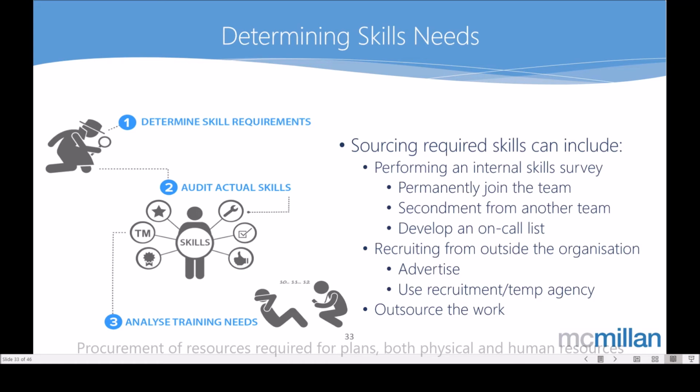So part of that, often as part of the planning process, is doing some type of skills analysis or determining what is required, and that's just a matter of identifying as you're going through the breakdown of your planning. As I talked about, particularly when I was talking about work breakdown structures, project tools for planning, identifying the skills that you need. You list down those skills, and then you can have a look at your existing team or workforce. Are those skills available? So you undertake an audit.